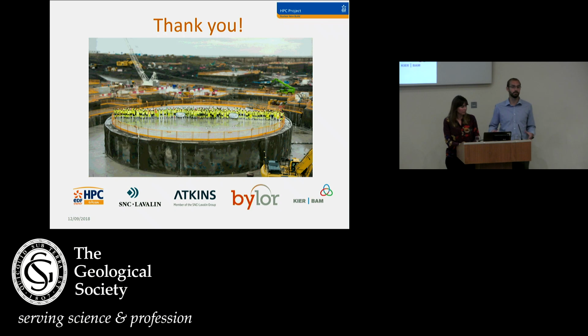We've reduced the size of the elements because, as I mentioned, we got involved at an earlier stage in the design process. For a lot of the buildings we were doing, we were brought in as a level 3 designer, almost, just to ratify the design and detail it and ensure there weren't any issues with soil structure interaction. And there it's a lot more difficult because the design is further down the road, and it's much more difficult to make any significant changes. But where we've had the opportunity on a number of the ancillary structures, we've been able to do some value engineering, and that was some of the most recent work we've done on the buildings.